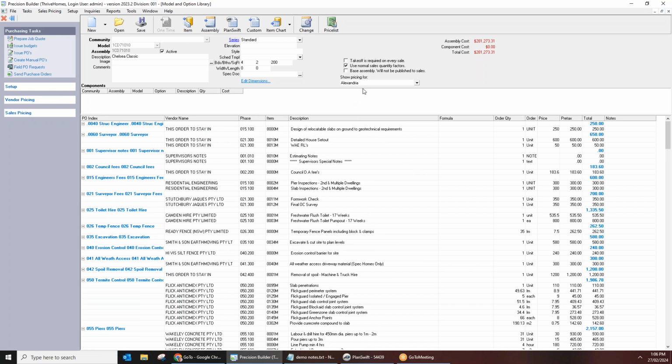And then this area is very important. It will determine what suppliers we use when we're building that area. And currently this is coming out at 281,000, but if I build it in a different area, say Bondi, it comes to 282,000, so it's about $1,000 difference. And why would that be? So one example would be where we use different vendors.